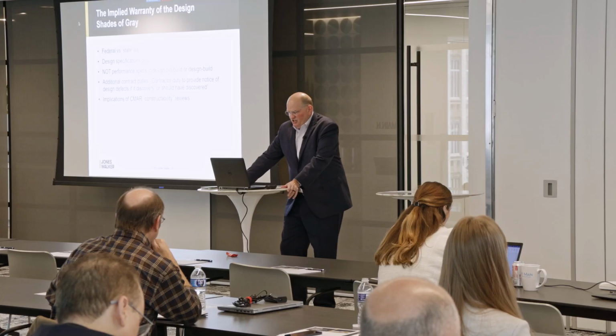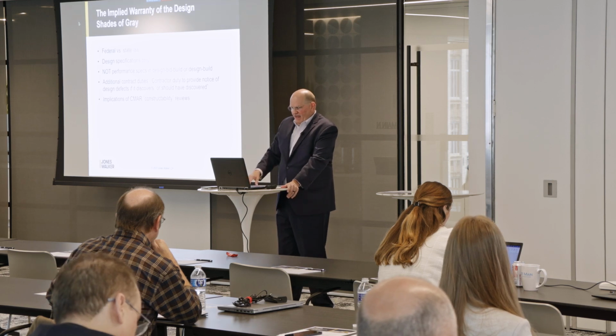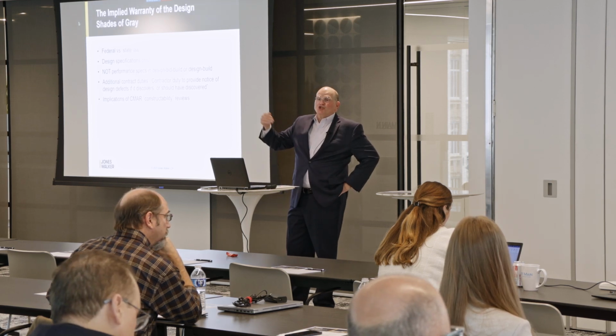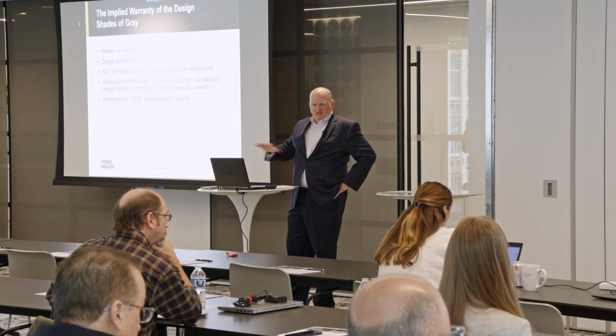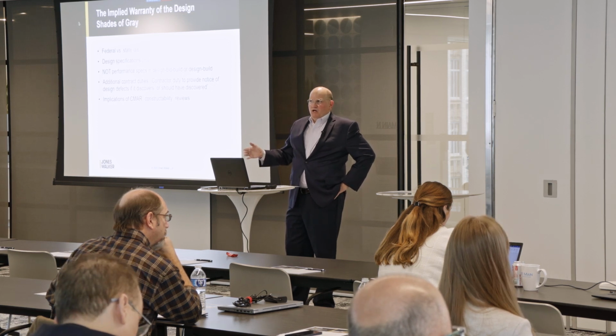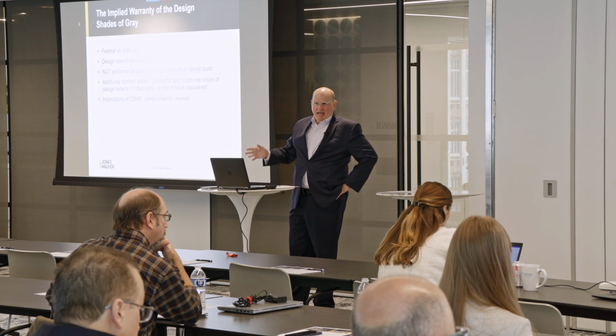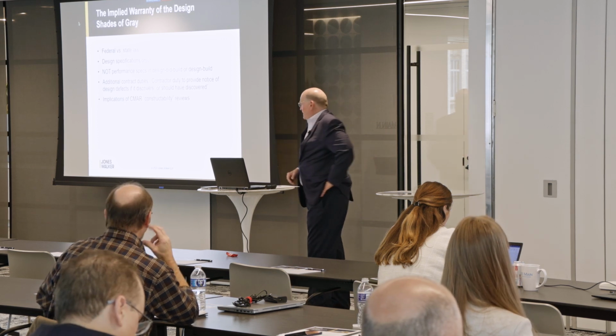So then at that point you get into a factual argument. And you could have one factual argument about patent and latent defects, and if you know about it and it could be proved, boom, you got to raise the issue. You can't lay behind the log, you can't sandbag, and then come out and complain about the defect later and try to take advantage of it. You could fight over that. But if you throw in there "or should have discovered," that just opens up potentially a lot more liability and at least a Pandora's box in terms of fighting about it.